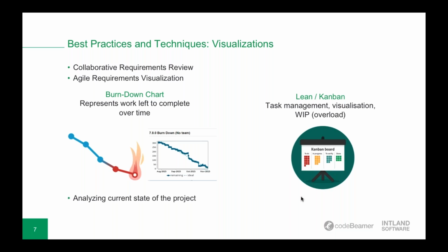Okay, so yeah, everything can be monitored here and reported basically, and enhanced flow is ensured, so to speak. So when something is finished, the next highest thing from the backlog can be pulled in to take its place if you don't have any overburdened columns. Okay, so these two, the Scrum and the Kanban, are the most widely used because Kanban isn't just a visual tool, it's actually also a methodology, so a way to work.